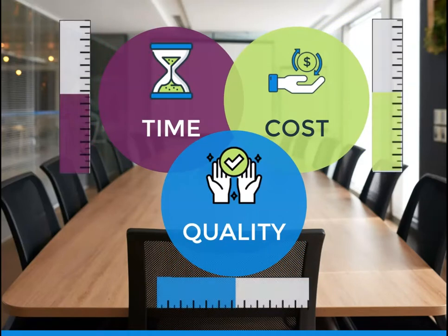For example, if the schedule is shortened, often the budget needs to be increased to add additional resources to complete the same amount of work in less time. If a budget increase is not possible, the scope or targeted quality may be reduced to deliver the project's result in less time within the same budget amount. Changing the project requirements or objectives may create additional risks. The project team needs to be able to assess the situation, balance the demands, and maintain good communications with all involved.